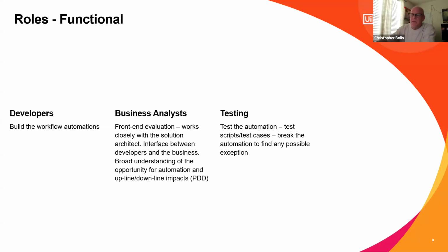And they should be developing something called a change matrix, which is just a spreadsheet that says, these are the changes requested, these are the changes approved, these are the changes that we're going to incorporate, that kind of deal. This person is a very critical part of a scalable or a scaled CoE.